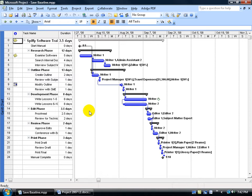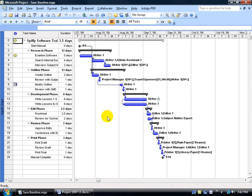To save a baseline, again, before you begin your project, which is really late now because if I save a baseline now it's going to take a snapshot of whatever it is I have now. So again, the emphasis is to save a baseline before you begin your project so you have your originals, and then as things change throughout the project you can always compare that against the original or that snapshot.